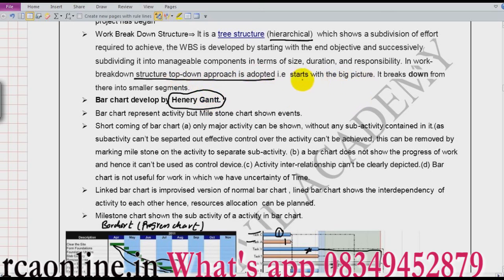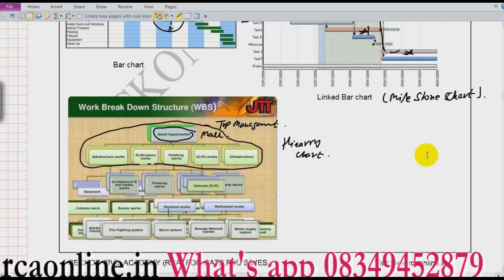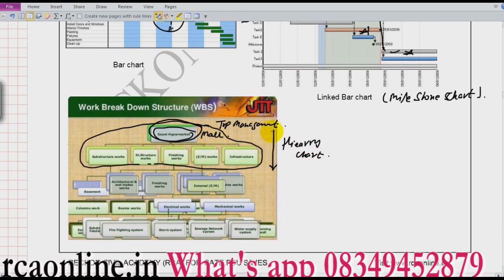An important point about work breakdown structure: we work on a top-down approach. We should start with the bigger picture. The bigger picture is the construction of a mall, and then we divide into smaller activities. So we are working from top to bottom. Our aim is to construct a mall and then we have different activities underneath — this is work breakdown structure.